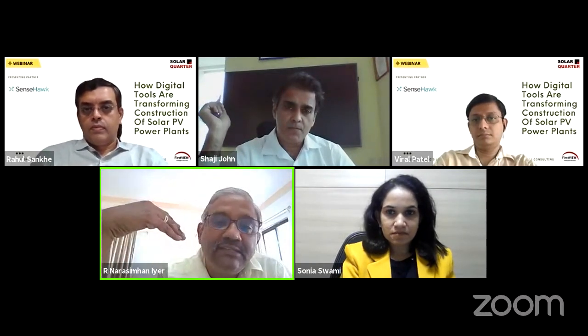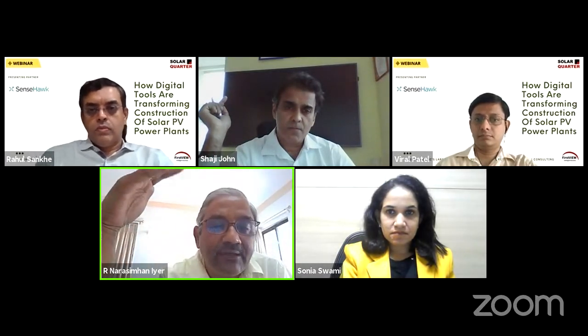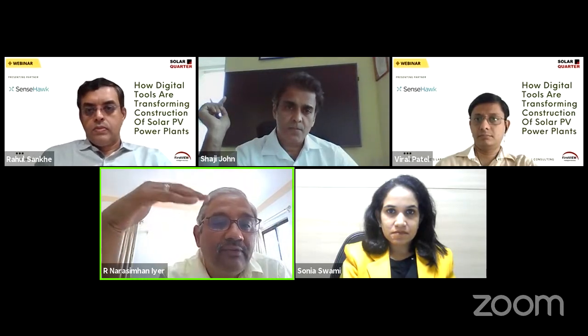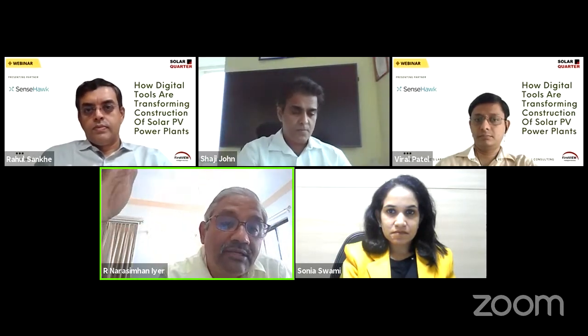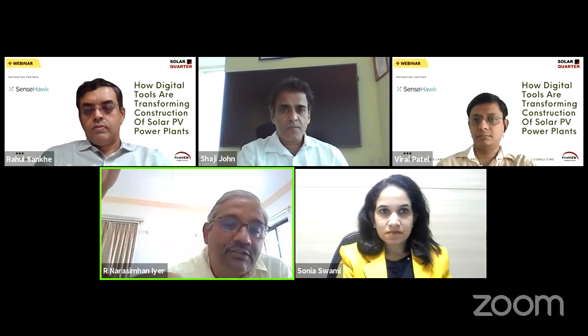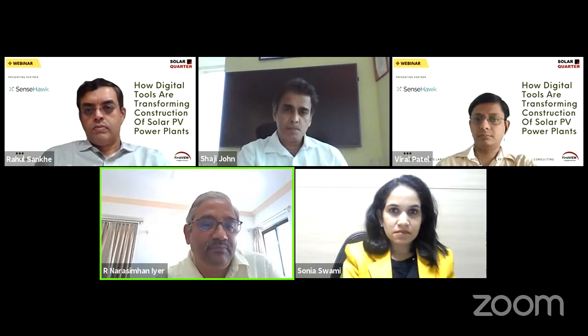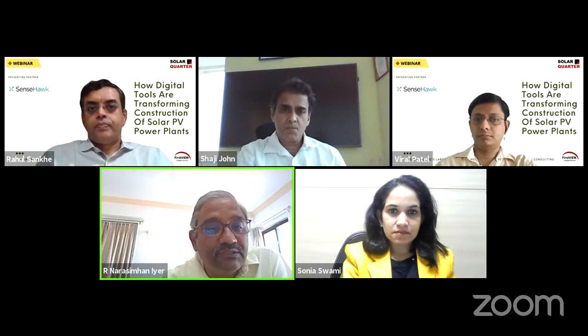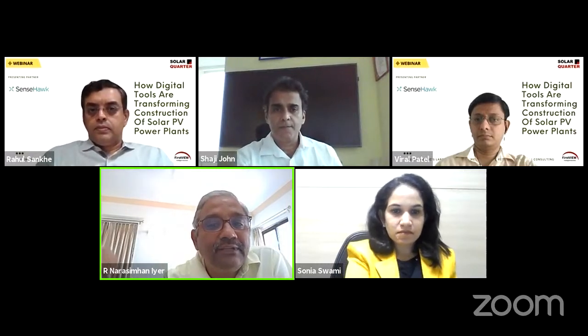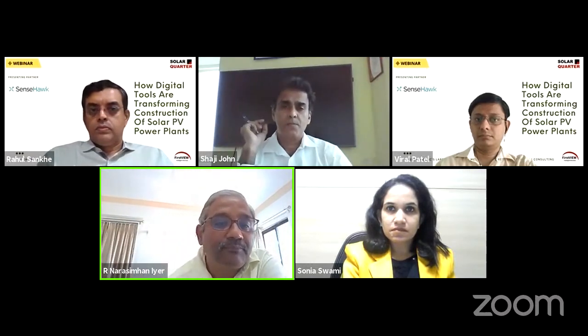As Rahul has pointed out, I could see that large plants take longer. I don't see that. Large plants are given the same time to get finished. For a large plant, from the time you hit the ground till the time you commission, it's not more than 7 months maximum. Sometimes you are under pressure to do it even under 6 months. And with everything now getting precision oriented, the people at the back end are calculating every single day, like the day you want 100% production.